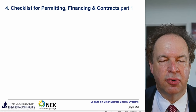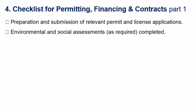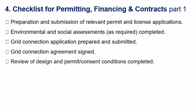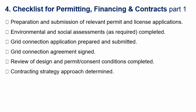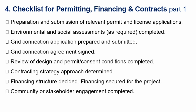The checklist for permitting and financing contracts: preparation and submission of relevant permit and license applications; environmental and social assessments are completed; grid connection application prepared, submitted, and agreement signed; review of design and permit consent conditions completed; contracting strategy determined; financing structure decided and secured; community or stakeholder engagement completed. Solar PV tender documentation prepared — you give all the technical specifications: how much hail resistance is required, what wind loads there are, whether any special coating is needed for dust accumulation, and how big the foundations have to be depending on the ground.